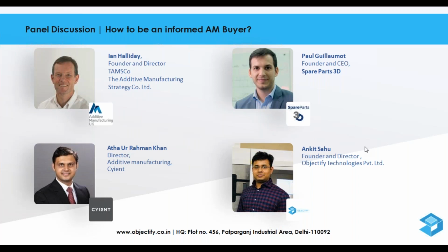Okay, so you wanted to know about Formula One. I think one of the really key points is the one that Arthur was making regarding partnership with the supplier. Everybody can gain by getting the supplier involved very early in the design and development process. So although you're involved with the whole project for quite a long time, when it comes to the point where the part is really needed, you've done all of the hard work, you've designed for the process, you've tested out the difficult areas for building the part, and maybe built sections of the part, and then when it's really needed, you can get on with it.